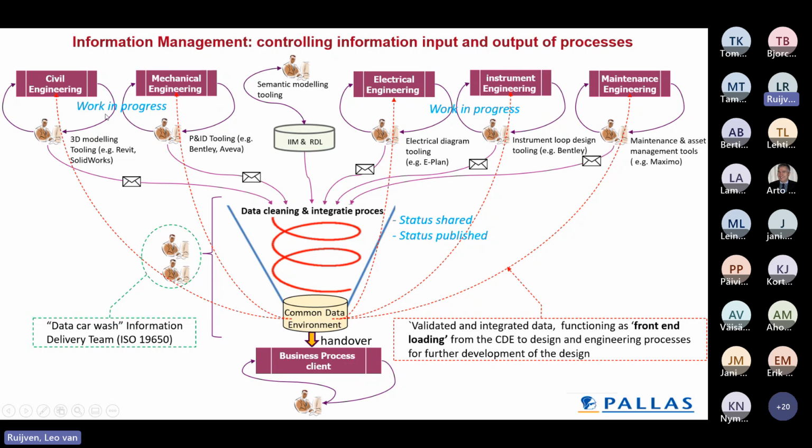So we recognize that the work in progress status is done in the tooling themselves. In the CDE, the common data environment, has the status shared, meaning sharing between the disciplines, and the status published as baselined and handed over to the client.